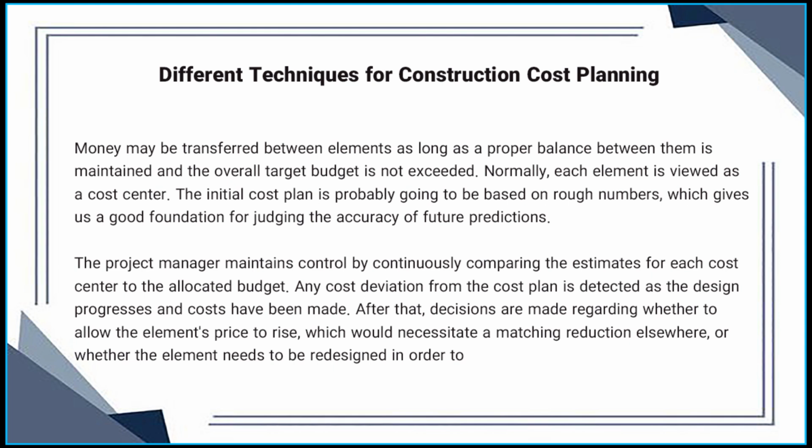The project manager maintains control by continuously comparing the estimates for each cost center to the allocated budget. Any cost deviation from the cost plan is detected as the design progresses and costs have been made. After that, decisions are made regarding whether to allow the element's price to rise, which would necessitate a matching reduction elsewhere, or whether the element needs to be redesigned.